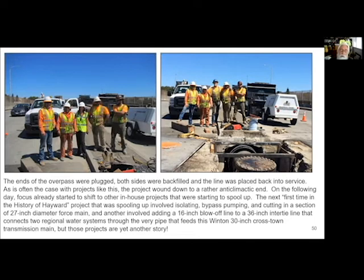Great. And Robert Scott asked, what happened to the sled structures? Did you leave them inside? The sled structures, yes. Oh, yeah. No, that's what the pipe is sitting on. So that became the pipe support, rather than just leaving the pipe laying on the ground. They were the cradles, and they are what actually supports the pipe within the overpass. And that's also what in the future will allow somebody to pull the pipe back out.